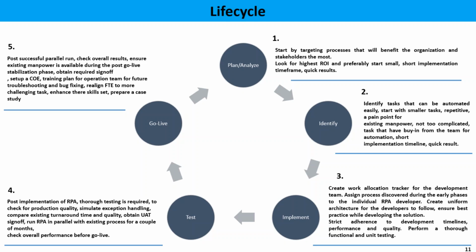In user acceptance test, basically the developers will not have any edit option. They will only be seeing. In this case, in UAT, the operations people will be running your automation, and you have to sit and see what kind of things are going on, if any kind of issues are happening at any time. Those kinds of things we'll be doing in the UAT phase.